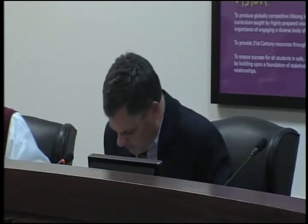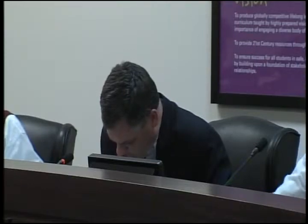The bid alternates that we were recommending, which is that number 6 item, include bid alternate number 2, which was glazed wall tile, and that cost was $66,800. Bid alternate number 3 was LED lighting. Dave, I don't want to interrupt you, but on the alternate, the glazed wall, you've got BBC provided. Is that Beam Construction? Where's the second B come from? It is Beam Construction Company. Okay, so BCC, I wanted to make sure I was following you. Go ahead. The LED lighting was at $40,500. And the bid alternate number 6 was train equipment. That was a no charge or $0 item.